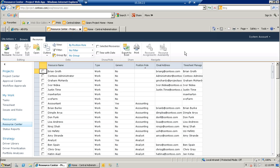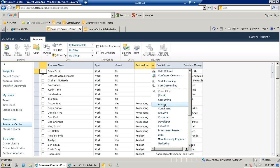So as we set up resources and assign them to projects or proposed projects, ideally we can assign them to a role. So each individual gets assigned to a position role, we're calling it here. And then that enables us to get a view not only of the individual and how much work they have on their plate, but also from a role perspective, are we over-allocated or under-allocated for that specific role? So for example, I can come into this resource assignment sheet and I'm going to select the analyst role.